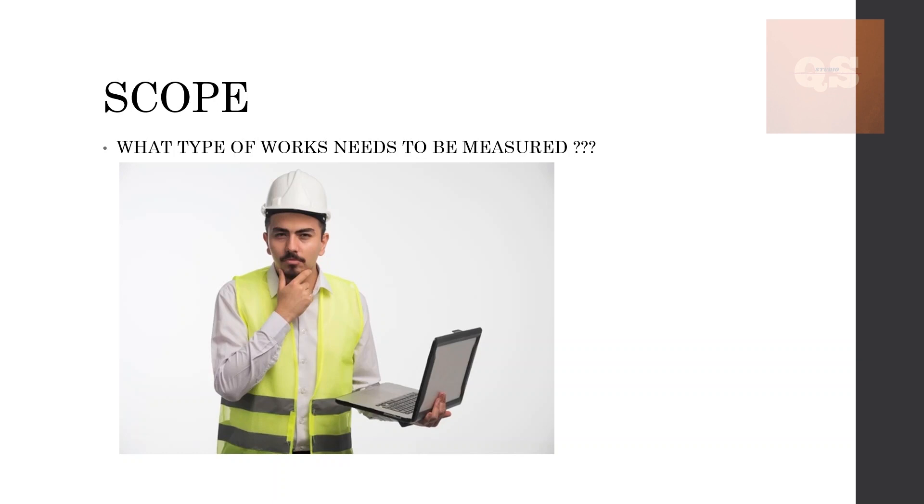As you all know, there are different work segments like civil works, architectural works, structural works, MEP works, and external works. First you need to get clarity from the client regarding what the scope is—whether we have to measure the quantities for all the civil activities, all the MEP activities, or just the MEP activities or just the civil activities. Get the clarity about that first, then only we can start our measurements.